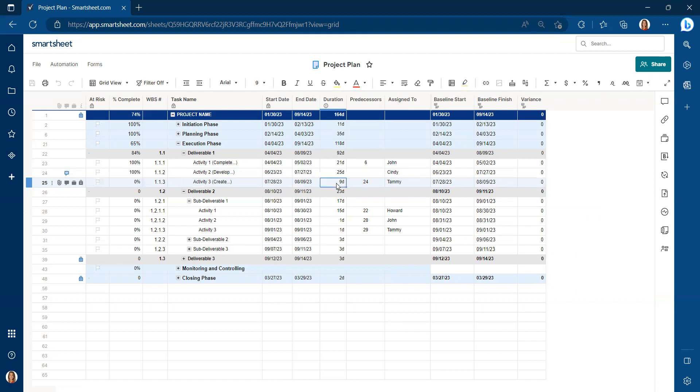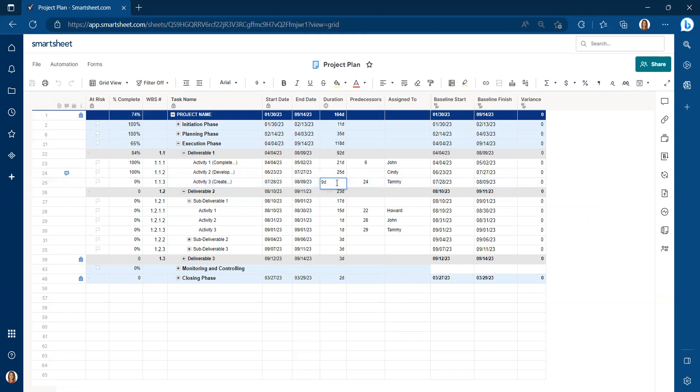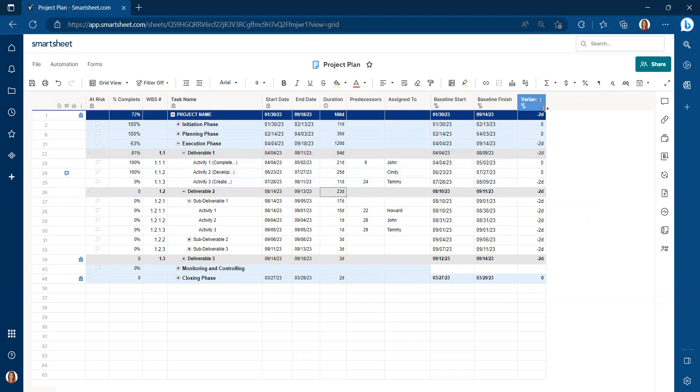I'm going to change this to 11 days. You'll now see we have a variance of two days. We're two days behind schedule because we needed to increase that activity. And our overall project variance is two days.